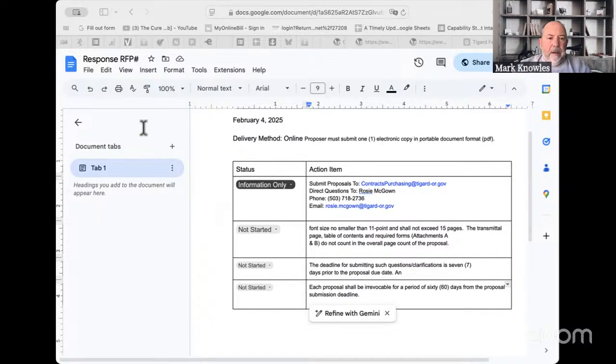Okay. Here's the deliverables and schedule and when they want the work done. This will also build into my pricing. My normal process takes about 4 months on average. If they want this done in 2 months, it's not that I can't get it done, but it increases my time requirements early on. So I have to increase my fee and I have to push things up so it can have a cost. If they give me a little bit more time, I potentially even can lower my costs, or I might be able to do 2 projects at once with someone else, so I can work on the pricing. So that's something I want to pay attention to.